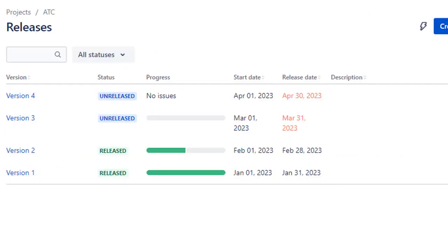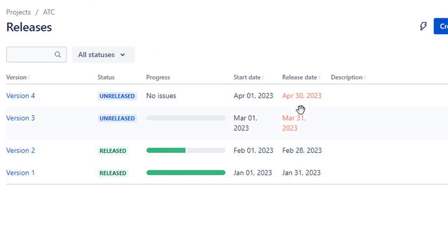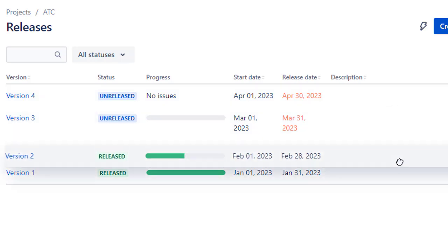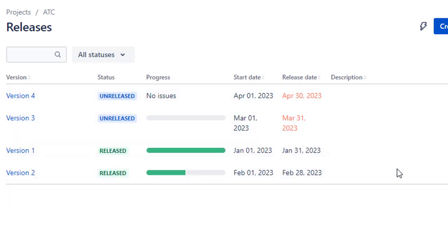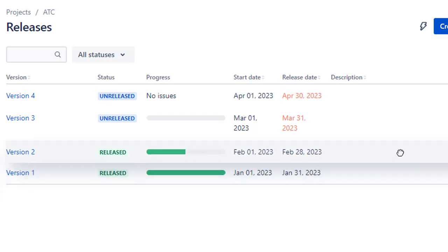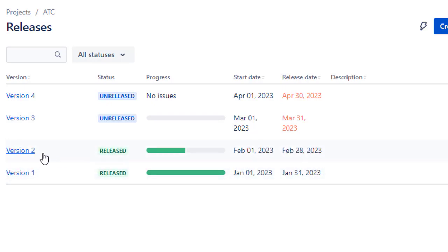It's important to note that the latest released version is dictated by the ordering of the versions, not the release date. Going back to the releases section, at the moment version one is listed as the latest release, so you'd need to drag version two up to make it the latest release.